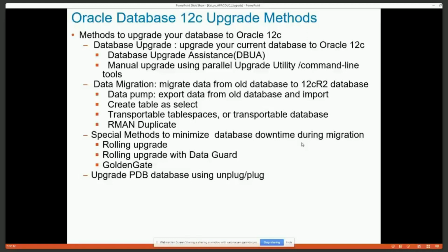that your old database is too old, or another reason is that it is too complicated and it's just not possible, or you have to upgrade several times before you can get to a destination. So in this case, you migrate everything. Another factor you want to consider is database size. Migrating a database takes a long time because you actually copy the data bit by bit from the source database server to the target database server. In an upgrade, you basically recompile your database objects so that your database can be adapted to the new version. So there's no data moving.